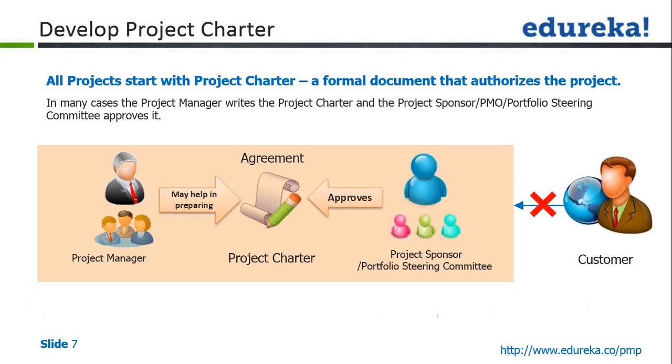And there is a question from Krishnan. Does the budget get mentioned in this project charter? You may or you may not, but you will have the rough order of magnitude here. You may have the rough order of magnitude here, that the overall project budget must not exceed $1 million. If needed, it is subjective. If needed, you can give this guidance to the team here, that whatever you do must be done within $1 million. You can set the constraints, you can set the boundaries also here.